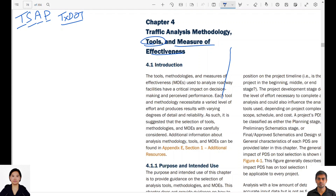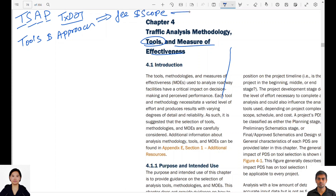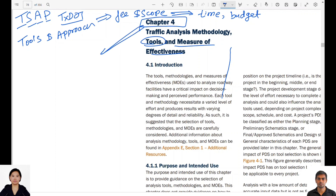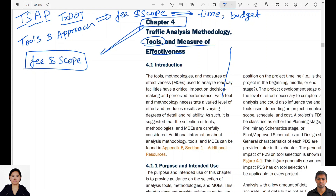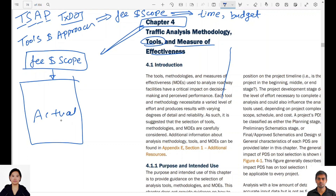Since tools and approach selection heavily dictates fee and scope, this chapter is very important to figure out the time and budget needed for a traffic task done as part of a project. Chapter 4 is most applicable at the beginning of a project, during the fee and scope stage, which is before the contract or notice to proceed has happened.